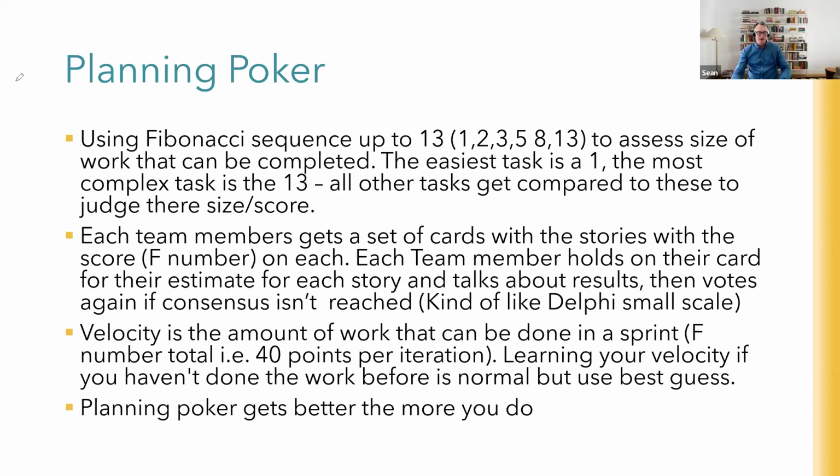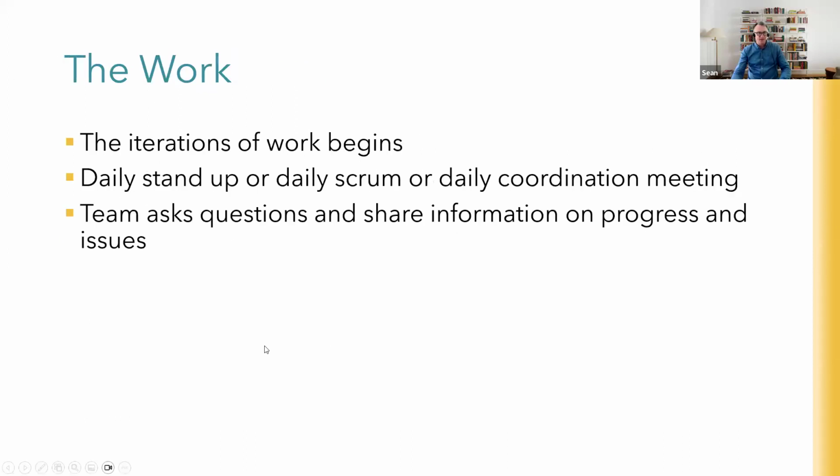Once you've done all the planning, the work of the iteration starts, and a key feature of any agile approach is these daily stand-up or daily scrum or daily coordination meetings. Very short meetings, 15 minutes at most generally, called stand-ups because in Scrum, no chairs are supposed to be in the room and you're supposed to stand up to encourage people to have a fast meeting. And you might find it's quite common for something like the Scrum coach or Scrum Master or Agile coach to just ask everybody 3 questions.